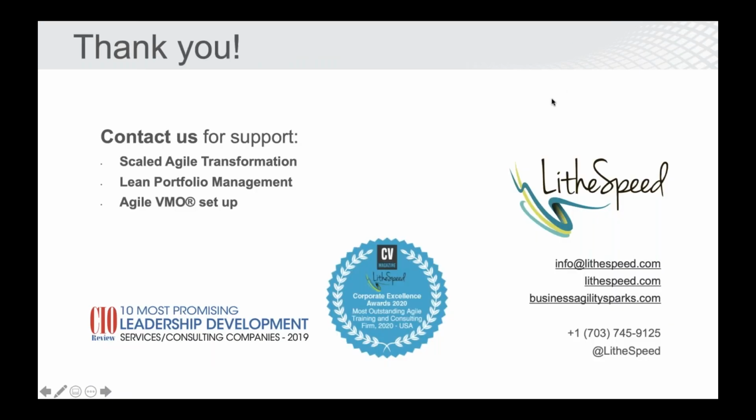Yep, I remember one time having a big issue in one of our clients around way too much WIP across the board, portfolio WIP, too many simultaneous projects going on. And then within the teams, too many simultaneous stories. Everything was just totally packed, and there's no room for anything to actually move forward. So our CIO decided that we're going to measure WIP, portfolio WIP and team WIP and WIP at different places. And just putting a measurement around it made it go down. Just the very fact that you're looking at it helped to start to change people's minds around it. And of course, once the WIP went down, stuff started to flow, right?